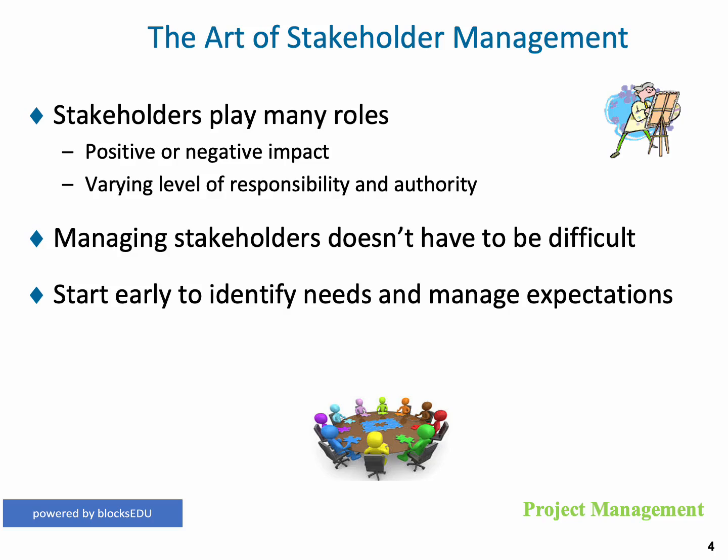Now, a more difficult thing is to move a stakeholder who is against your project into one who's for your project. Well, there are two strategies that you can use. Strategy number one is, if that's a high influence individual that's against your project, then align that individual with a high influence individual that's for your project and get them to have a dialogue and demonstrate the value of the project to that individual.